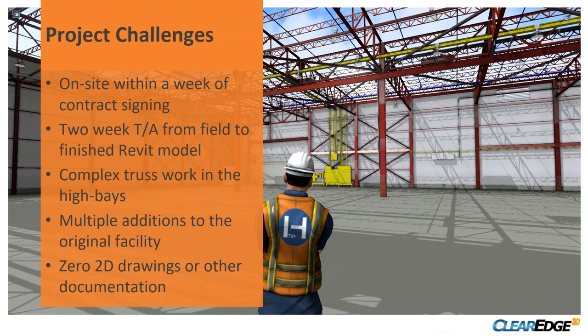And those high bays were a little bit difficult. When I say complex truss work, a lot of people will go ahead and assume that every truss is the same, but as I mentioned, over the history of the building, things have changed a little bit, and they had also had some previous crane rails built in there, so certain members were beefed up or changed out, and so the assumption that everything was going to be the same and quick was not quite the case. And I'm sure you guys with the previous project in the presentation came across the same kind of information as you will in most facilities.